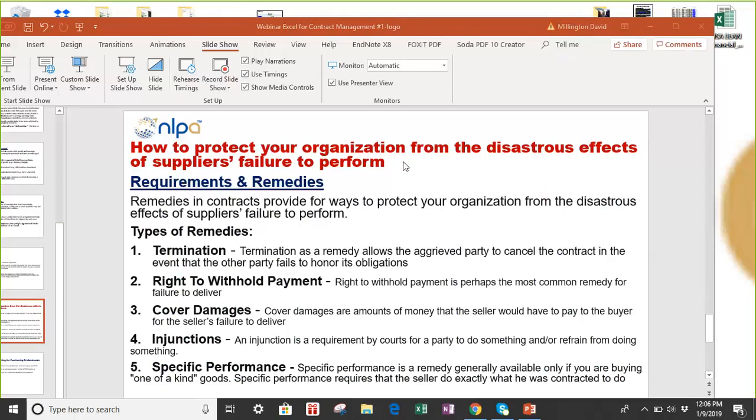And then on a scale of 1 to 10, you would score and assess the severity and the impact of a particular disruption to the supply chain, your customers and your organization, the fiscal impact of the particular supplier's non-conformance. So if 10, that means the impact is severe on the customers and it's severe on the organization.